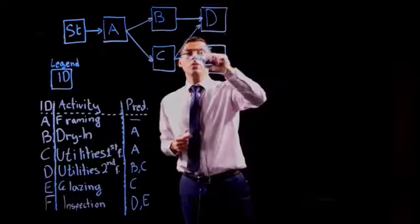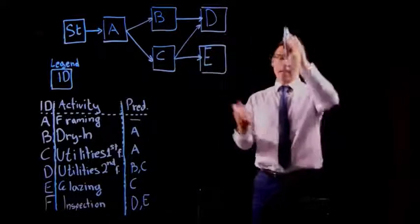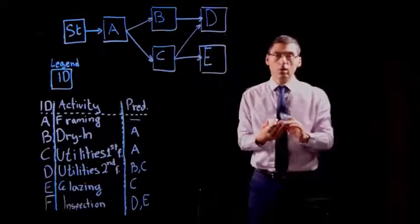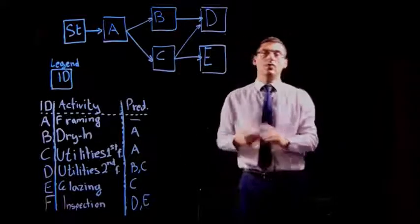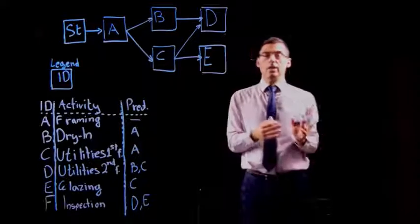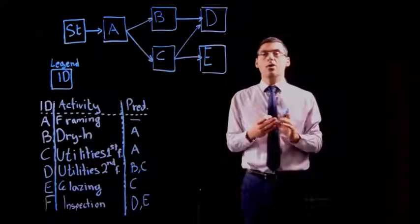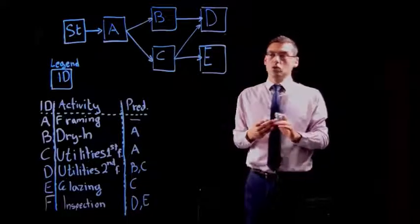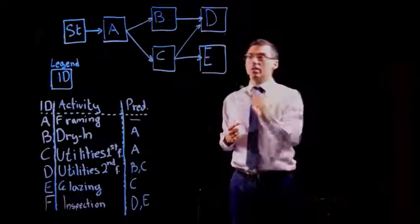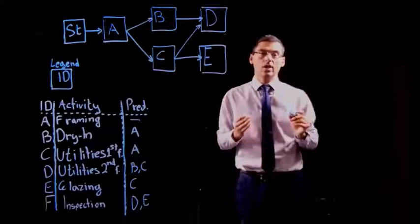Don't worry about where you are going to put exactly the node on the network. That's not a big worry. You can go further down, further up, left or right, wherever you have space. Although it would be nice to follow the sequence of execution. However, don't forget that this is what we call a directed graph.